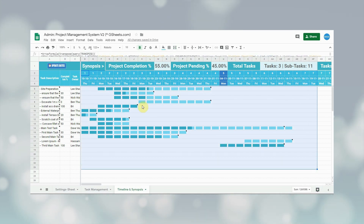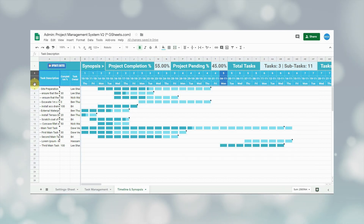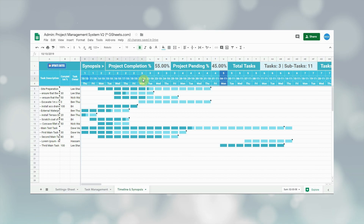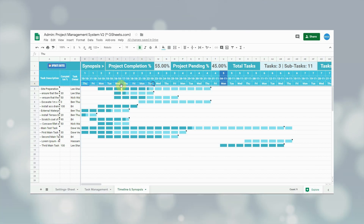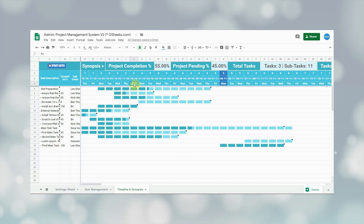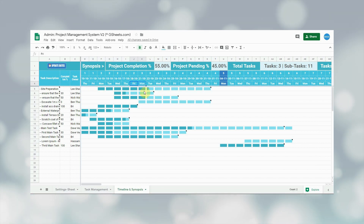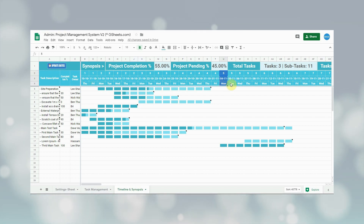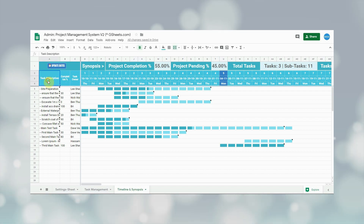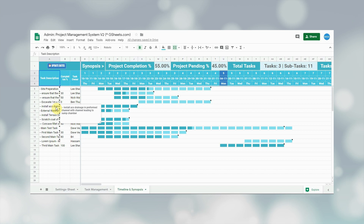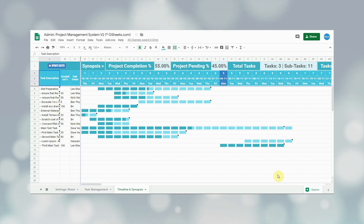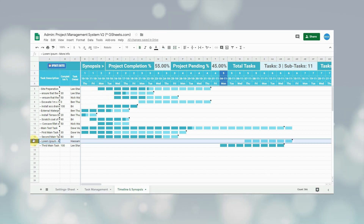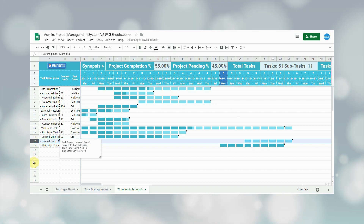On the right side is the project timeline with a Gantt chart view. The timeline header has three rows: the first row represents the weekly timeline showing week numbers, the second row shows dates, and the third row shows days of the week. Since Saturday and Sunday were selected as weekend days in the project settings, they are not shown here. The current date column is highlighted in a different color and will automatically update. The Gantt chart also gets updated automatically based on the task management and staff sheets — for example, the child task titled 'Lorem Ipsum' added earlier is now automatically visible here.